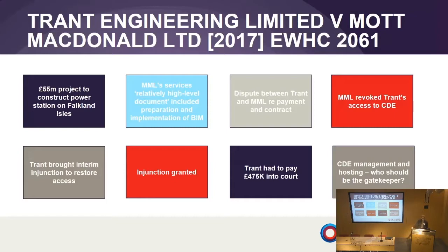Interestingly, in the contract document that had been kicking around was a limit of liability on Mott MacDonald's part of £1 million. The dispute rumbled on, as I said. Mott MacDonald were responsible for implementing BIM on the project and, as it would seem, hosting the common data environment. They'd set the common data environment up, Trant had access, documents were flowing around, the dispute came to a head and Mott MacDonald withdrew the passwords for Trant, so Trant could no longer get into the common data environment.